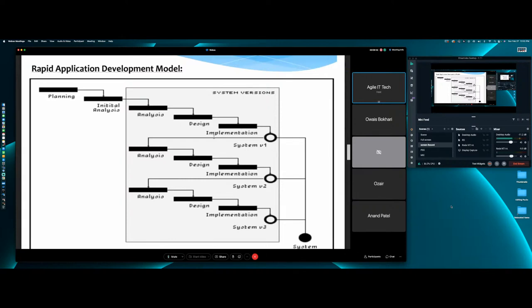Imagine these were three delivery teams. By the way, which team is on a critical path? Which is the most critical team between team one, two, and three? Nope. You mentioned both the wrong teams. What does everything get bolted onto? Suspension and chassis. If the chassis is delayed, what are you going to do, sit on the engine and go vroom vroom? No, you're delayed.